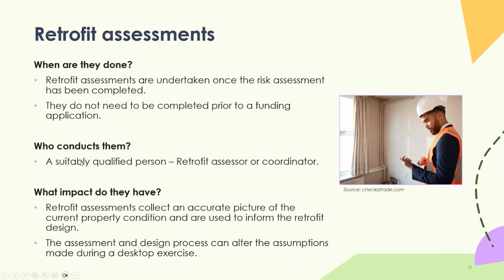As it says there, they don't need to be completed prior to a funding application. Generally, funding applications can be done with a sample of retrofit assessments, just looking at a representative sample of the key archetypes of dwellings within the properties being included in the application.